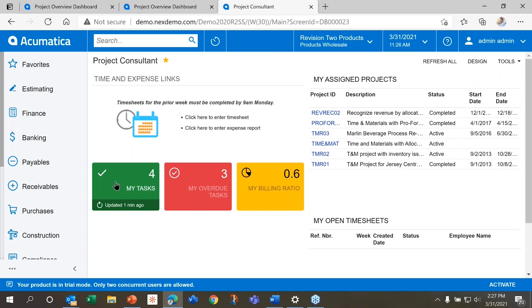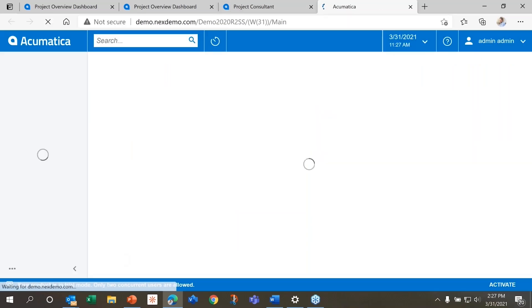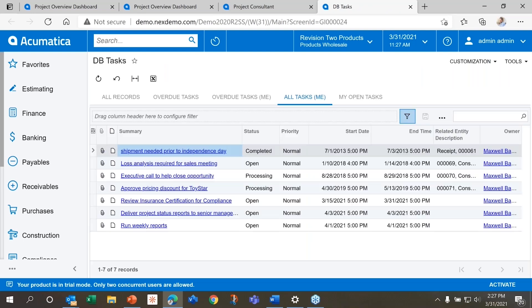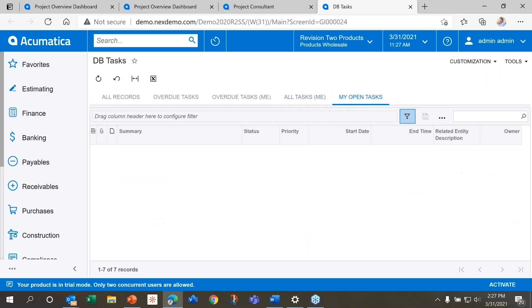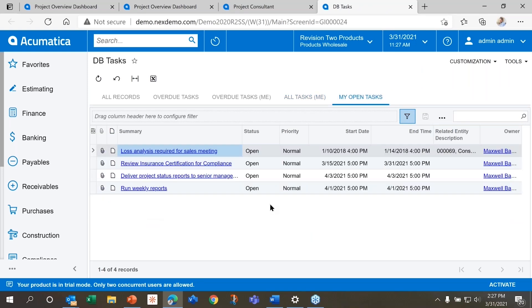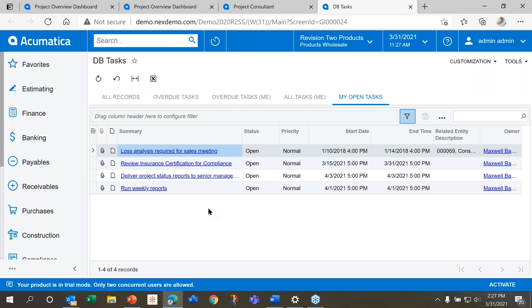Those can go alongside the workflow tool that's built into Acumatica, which can also send you alerts and emails. So if I have a task that goes overdue by two days, I can have an automatic notification that's fired off to let me know that I need to go back in and work with that notification. To see what's drilling down that area, if I was in as a project consultant, when I click on it, I can then come in and see the tasks. I can have tabs predefined and I can look at my open tasks. In this case, I can do that just by clicking this little funnel here and I can define by Boolean logic—greater than, equals, contains, those kinds of things to show the data I want. So this one, I have the one that shows my open tasks and there are the four tasks that were showing up on my dashboard. I'm logging in as a project manager. When I would come into my project manager dashboard, I'll see that I have these tasks. I need to run my weekly status report. I need to review insurance certification and compliance, make sure that I am managing my day-to-day tasks.